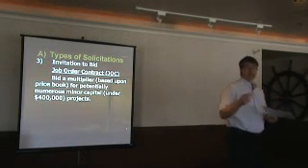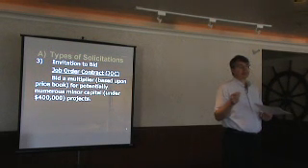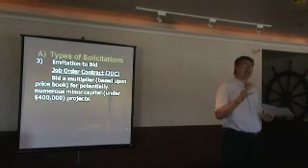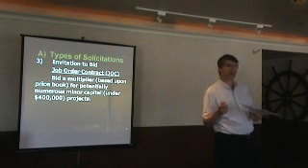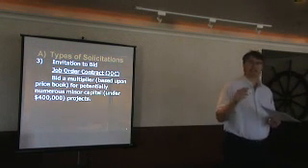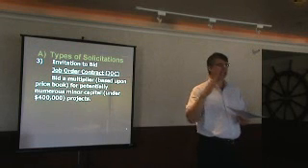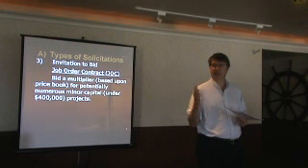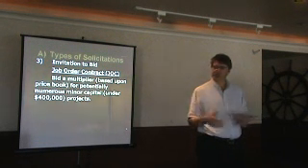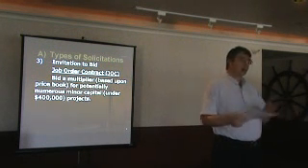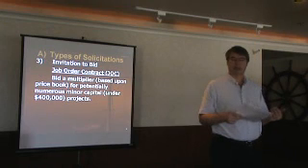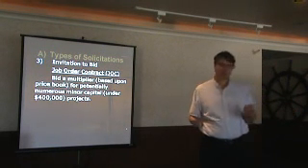Now we're seeing JOC come in, on other campuses, at 0.7, so 70% of the published rate. On our campus, we tend to see it closer to the 80 to 97% range. So again, it gives you a feel of the market out there. Job order contract, you're bidding a multiplier, but again, the cheapest multiplier wins, it's a competitively bid situation.